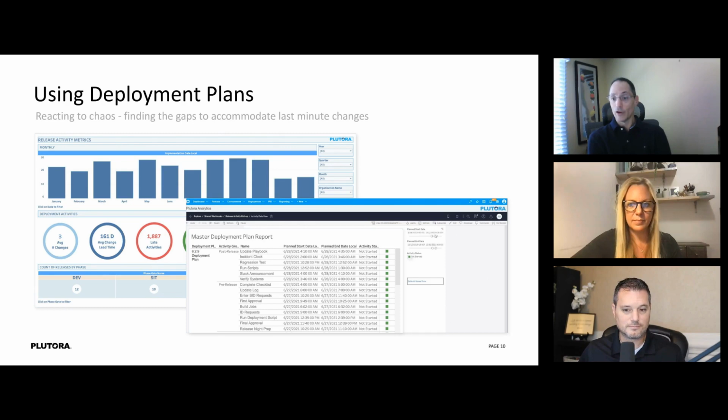So, Helen, you were talking about rubber stamping before, right? Part of your deployment plan is how much time do you need? And things have to be stacked up. It's dominoes, right? When you're doing all these things stacked up really tightly in a short window. So you need to be able to know, because I depend on the other guy, and if I don't start right, then I go late, and if I go late, then the next guy goes late, and then the whole thing falls apart.